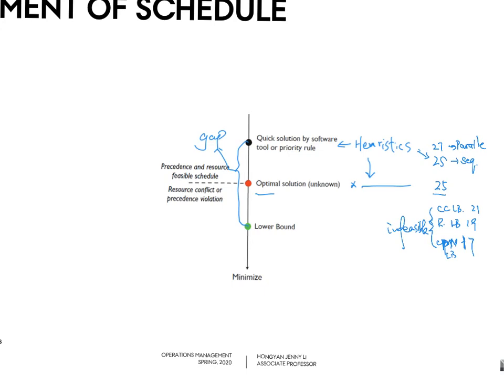You can see the sequential heuristic performs best. We don't know if 25 is optimal, but it's close to 21, so it's good enough to accept. Also, we cannot find a way to continue to improve it, which is why we consider it a validated good solution.